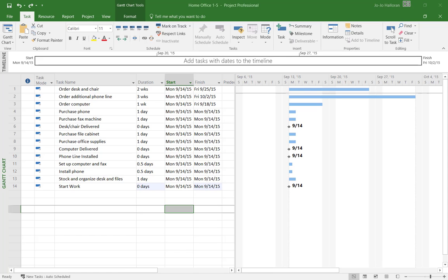So, you really want to go back to page 26 in your lesson 1 and review about linking tasks, because this is really important, one of the most important parts about getting a schedule into Microsoft Project. Now, when you go into tasks and when you link tasks, that is a connection between tasks that helps control the sequence and defines relationships between the two links.